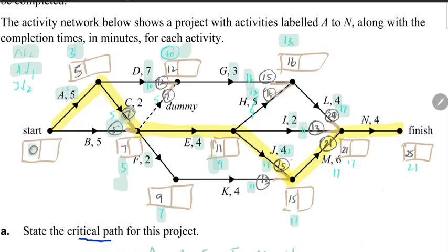And then let's look at, should we reduce M at all? 11 plus 6 is 17. Now I can see another 17 along another edge, so it's no use reducing M anymore because I would have chosen this 17 anyway, even if that value is lower. So we don't need to reduce M at all, and so 11 plus 6 is 17.